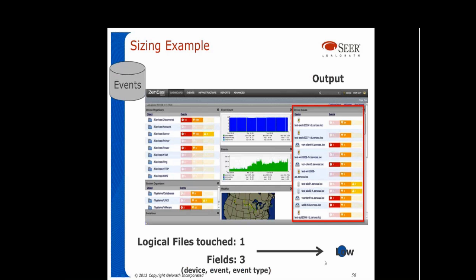Function point size and complexity, some people obsess about complexity. Honestly, if you're within a certain number of fields, you're fine calling something low, average, or high. You don't have to sweat about whether something has 19 or 20 fields. Choose high or choose average depending upon the other factors that are present. If it looks like an average and it has 19 fields, it's probably an average. If it looks complex and it has 19, then just make the jump into high complexity.